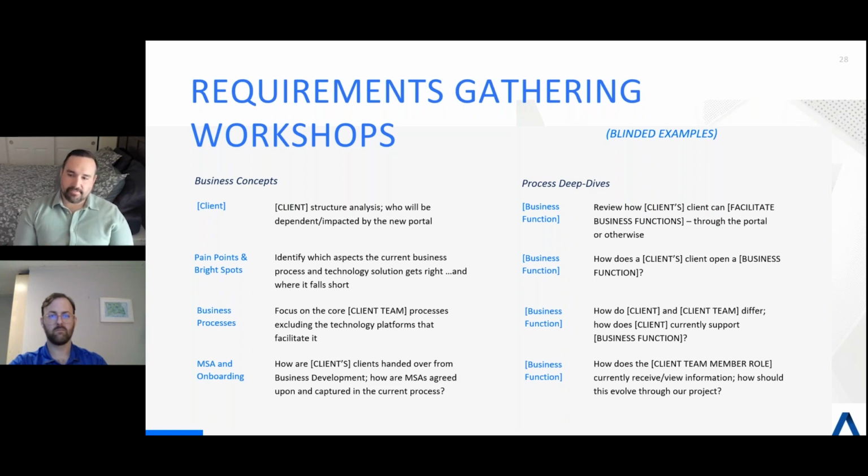And so we saw 8 here. I will admit the customer did not see the need for 8 one-hour presentations plus a 90-minute follow-up at the end. They thought it was more requirements gathering than needed because they'd already done a thorough internal requirements gathering process before they hired us. But by the end of it, we ended up executing, I believe, 12 to 15 workshops, because in that 1-hour workshop there's a lot of good conversation, and it's like, hey, let's table it. Let's have a follow-on for that.